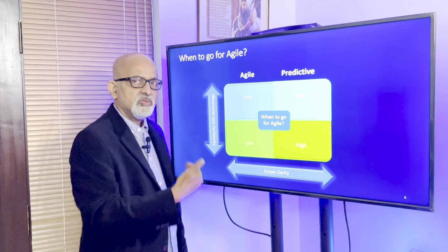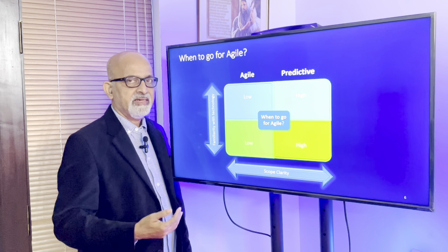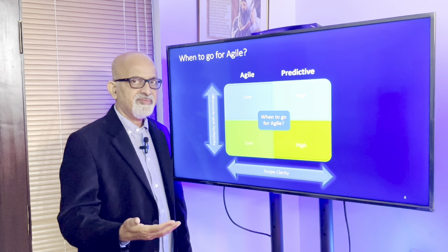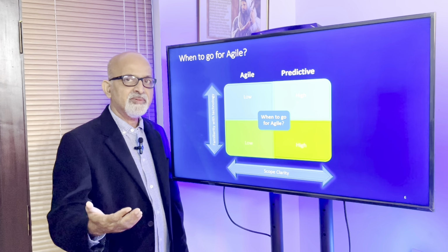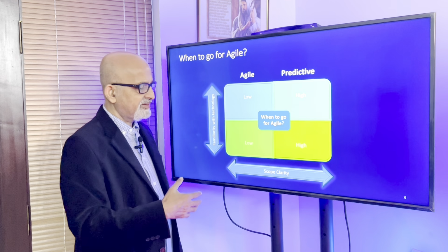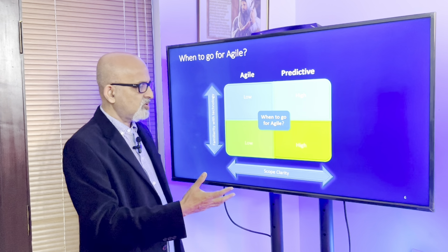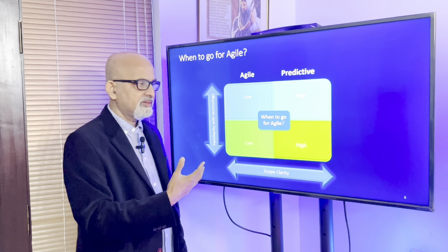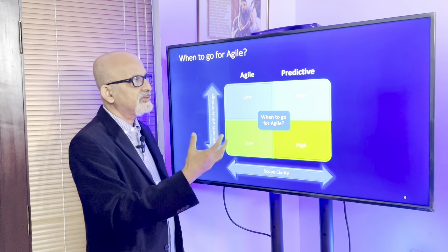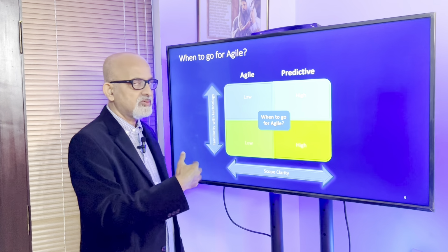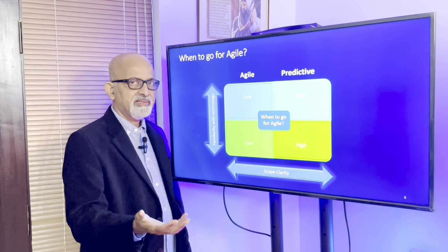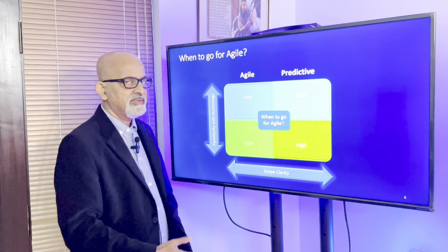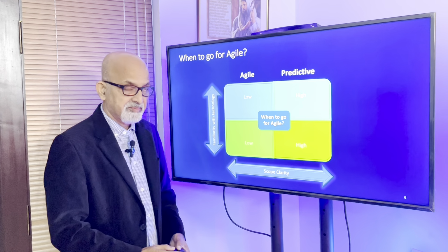But then most of the new product development and IT projects, and maybe even the architectural phase and the engineering phase of even EPC projects, there will be a lot of ambiguity about the scope as well as new technologies getting used in the project. Then still during the early phases of an EPC project, we can go with agile. And definitely for IT related projects and R&D based projects, definitely agile is a good option.